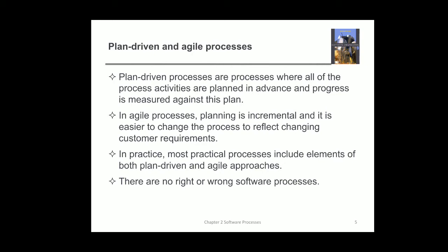But in agile, planning is incremental. That is, we will have a smaller plan for either 1 week or 10 days or a fortnight. We'll not have a plan for 1 year or 2 years. And it is easier to change the process to reflect changing customer requirements. When we follow an incremental model, the customer's changing requirements can be easily handled.